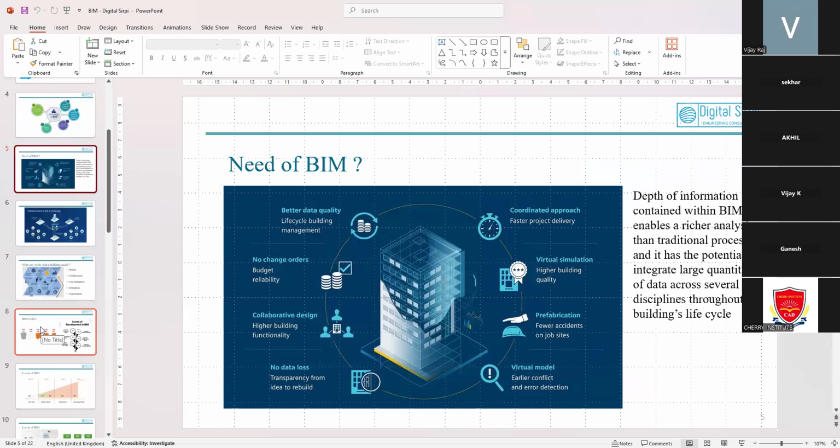So we came in and modeled the building in 3D, and we identified there was a mismatch between structural and architectural. They stopped that drawing and rechecked it, found that the issue was there, and then re-edited the drawings and resubmitted them. So this is why we made a 3D construction before executing the site.